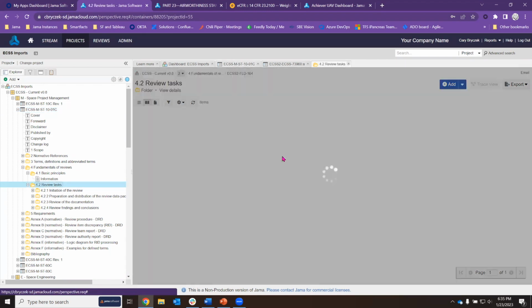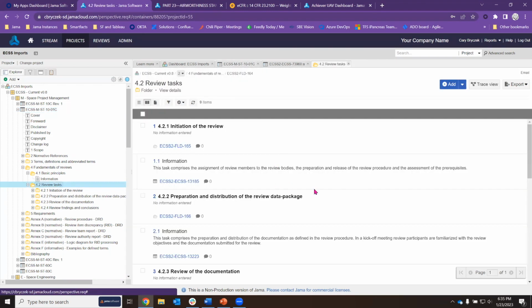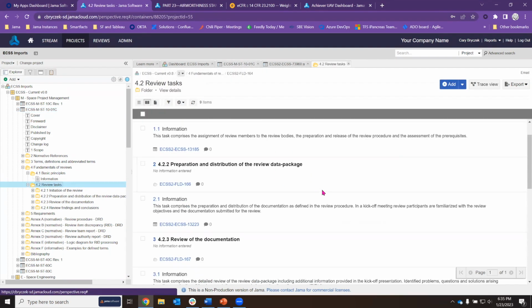And then the project management plan will say so-and-so shall develop a schedule, so-and-so shall, whereas the system requirements then get decomposed to be the system shall, and then the subsystem shall, and then the component shall, or whatever. Keeping that idea that the process is going to be implemented by somebody. It still has to be costed and part of the work breakdown structure, but it's not a feature of the system itself per se. It's a feature of the way in which the system was developed.